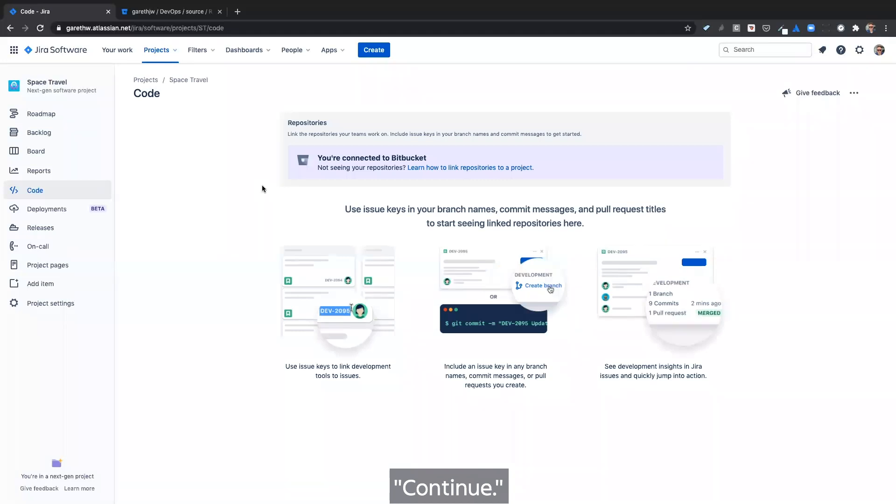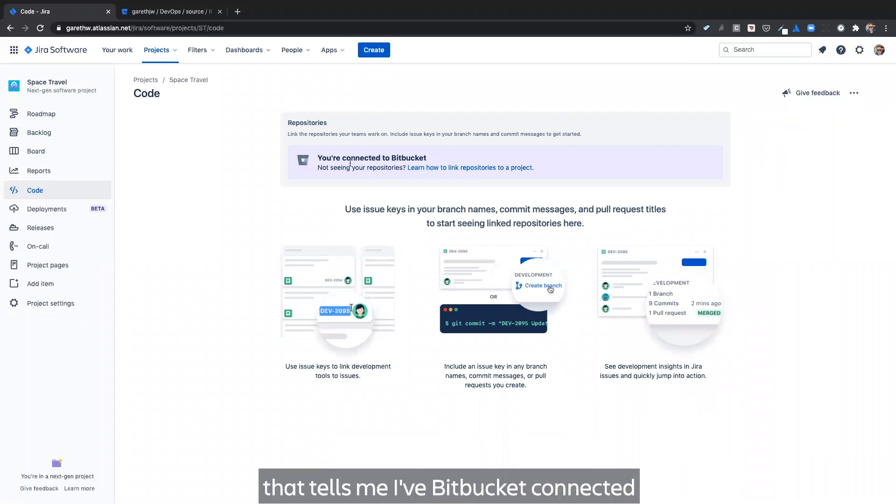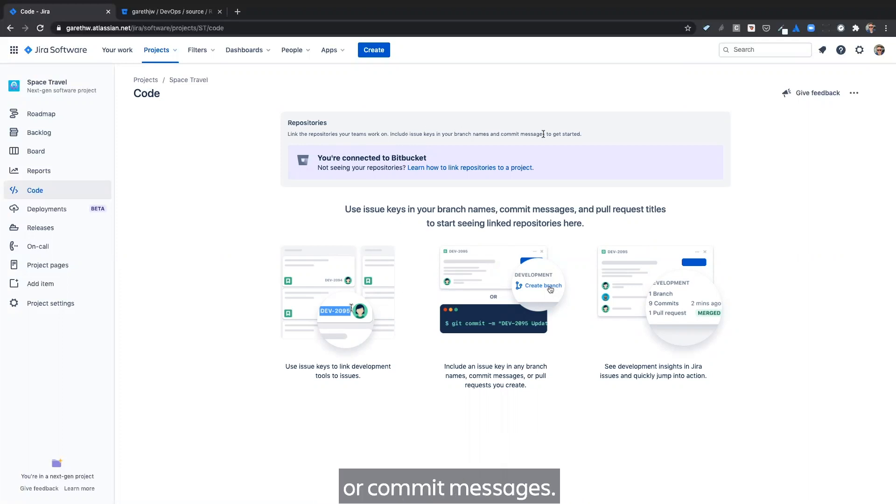Continue. And once integrated, I see this connected message that tells me how Bitbucket connected. And in order to start seeing repositories, I need to include issue keys in my branch names or commit messages.